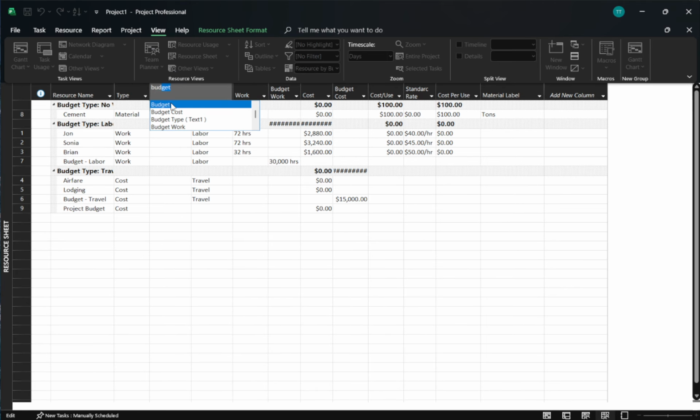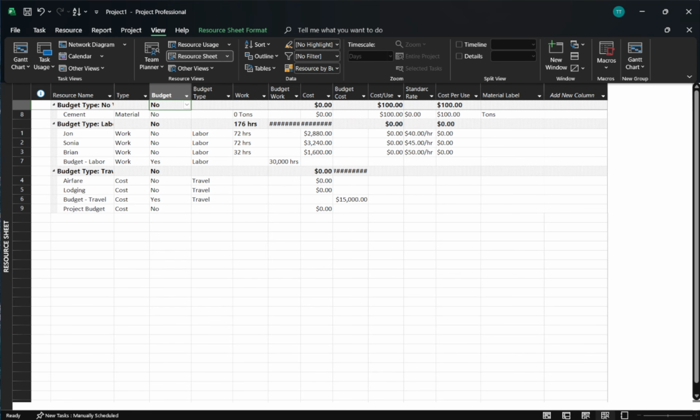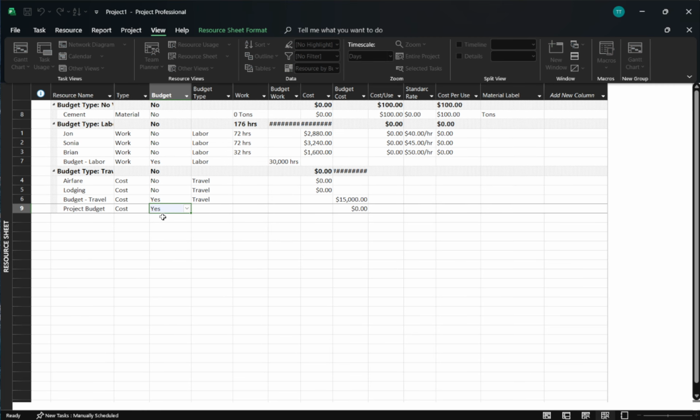With the resource assigned, it's time to enter the actual budget amount. Open either the Task Usage or Resource Usage view. Both will work for this. Insert the budget cost column so you can enter the figure. Type your total budget, for example 100,000, on the assignment line for the project summary task. Project will store that as the overall budget for the project and roll it up automatically.